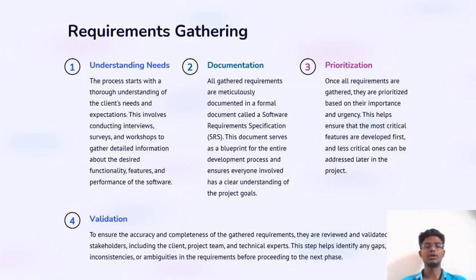To ensure the accuracy and completeness of the gathered requirements, they are reviewed and validated. Stakeholders, including the client, project team, and technical experts, validate it. This step helps identify any gaps, inconsistencies, or ambiguities in the requirements before proceeding to the next phase.